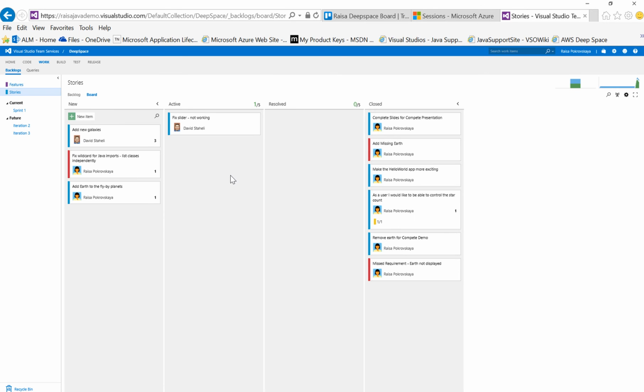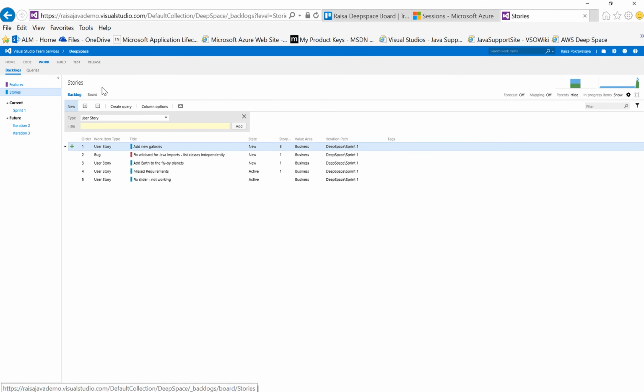You can go to the work section. The work section is your Agile planning section. So this is where you track your stories, your tasks, your backlog, and bugs. Here I have a Kanban board configured to not only show me the tasks, but also to show me bugs. That's the feature I have turned on so that I can see bugs with my tasks. And I can see here that I have 2 things I need to go do today. You can also look at it in a backlog mode for more Scrum type planning. But I'm going to use this Kanban board today.